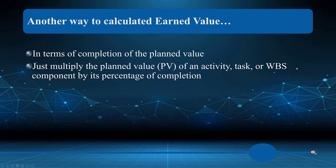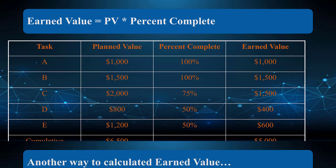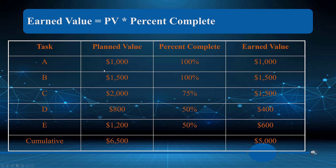For large projects this detailed analysis is definitely worth doing. In terms of earned value calculation, simply multiply the planned value of the activity or task by its percentage of completion — EV equals PV times percent complete. If a task is 100% complete the earned value equals the planned value; if it's 75% complete, that's where the variance between planned and earned value originates.